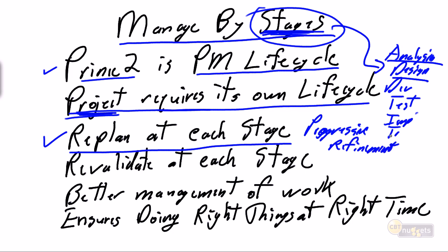When we started the project and did the original plan, we thought we could do this for $50,000, and that's going to be plus or minus, I'm going to say, a pretty big number, 100%. But we also did a detailed plan for analysis, and analysis was going to cost $8,000. We should be very, very confident on our analysis. We're within 10% or maybe even less that we can do analysis for $8,000.